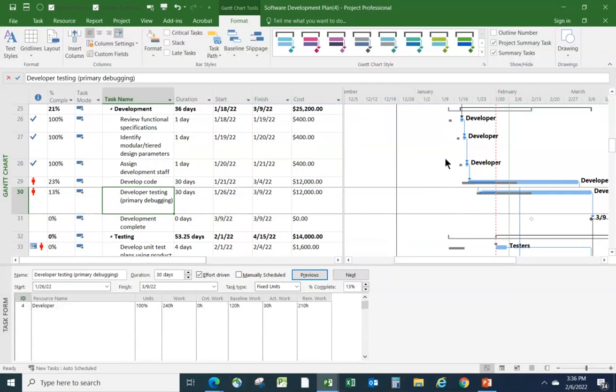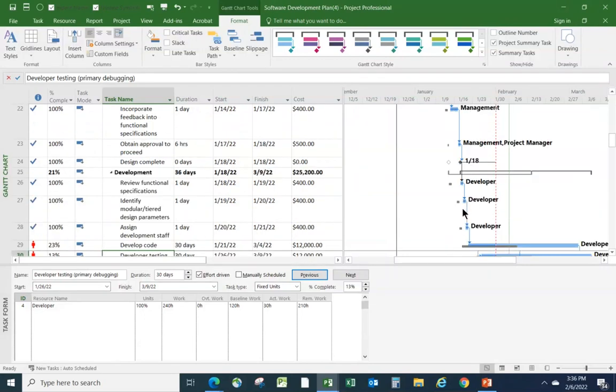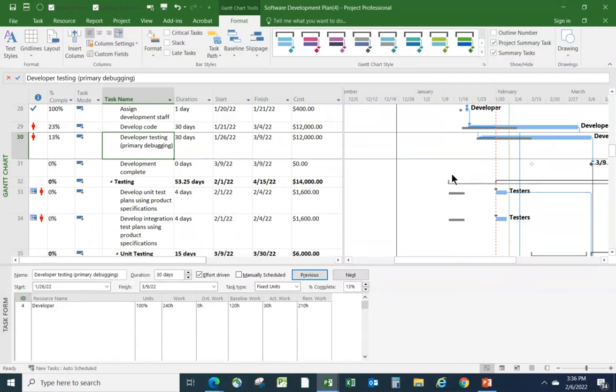And when we got into development, we've started increasing durations against the baseline, as well as having started a little bit later. Those late starts were a result of the earlier slips up here. And the other thing we've done is we just did not do any of the development of our test plans at all. But not a problem there, just eyeballing those, it looks like we've got plenty of slack before we run into any issues.